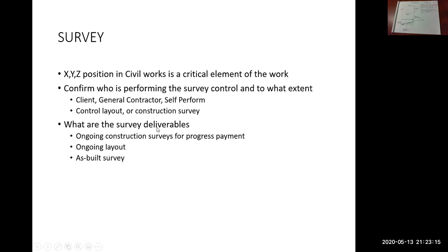Then your construction surveyor comes along, relates to those 3 or 4 different points that the city has provided, and based on the location of those points, the construction surveyors are then able to lay out the construction project. Again, there's a cost to survey layout, whether it's your own personnel doing it or you have a sub that's hired that does the layout for you.